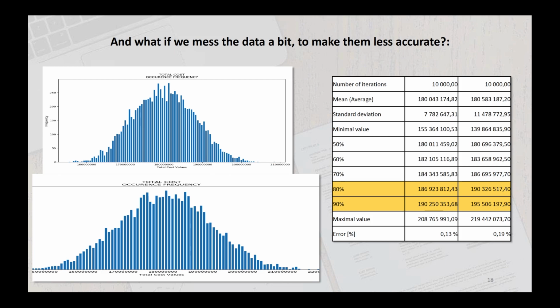One of the real advantages of this method is that it really helps to evaluate the quality of the data we are putting in. Let's see this slide. On purpose, I have reduced the quality of the data in the chart below. So this is the same cost estimate, the same 54 positions breakdown. However, I have widened some values in a couple of important positions, which theoretically might be due to imprecision or lack of confidence for those positions.